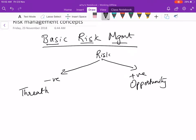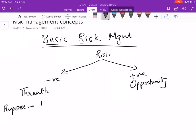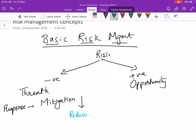So a threat when it occurs has a negative impact, so you have to prepare a response for that. For example, what will you do if you don't get the money for licenses? A mitigation plan is that you will use the trial versions initially. Mitigation reduces the impact of risk.